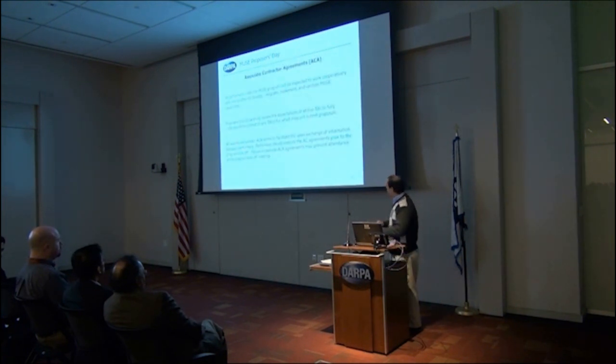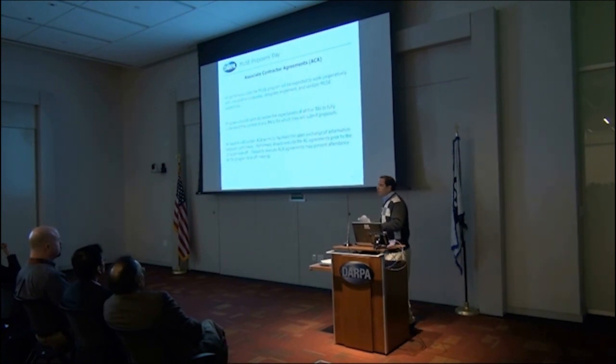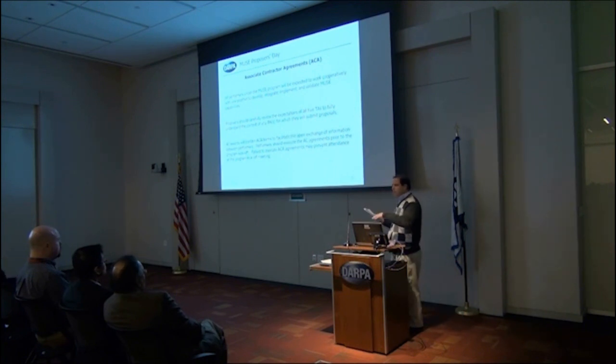Okay, so you heard mention of the ACAs, Associate Contractor Agreements. So this program is not competitive in nature in terms of the various teams that are going to be taking care of various technical areas. It is actually very dependent on there being cooperation amongst the various teams who will be operating under separate contracting instruments. So one of the ways that we make sure that we don't just luck out and that everybody plays nice, making sure that there's an information flow, is that we put ACAs in place.